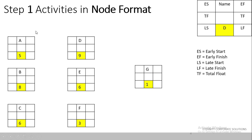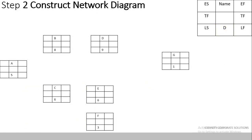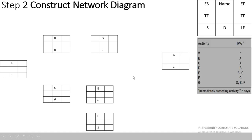There are seven activities and I have highlighted the duration of these activities, so Step 1 is clear. In Step 2 we will construct the network diagram. To construct it, we need to know the activity names, durations, and the information about predecessors and successors. On the right-hand side you can see the IPA — immediately preceding activities — as given in the question itself.